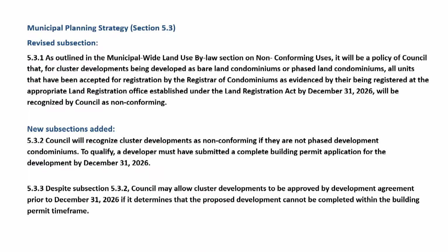It recognizes that most large-scale developments, for example land lease communities, will not finish within the standard 12-month building permit timeframe. It enables developers who are aware of this to enter into a development agreement if they wish to do so. The DA can also help streamline the permitting process for the remaining units, as any building permits issued beyond the 12-month period will be subject to the terms of the DA.